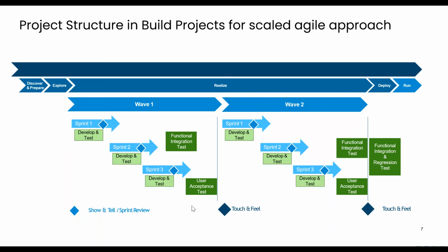The goal would be that at the end of this wave, we would execute a user acceptance test to make sure that the customer consuming these changes is accepting them based on the requirements they had in the beginning. Also, this user acceptance testing would equal a touch and feel. We would expect, for example, the end user to go into the system and actually run an SAP transaction, to understand exactly that that was the requirement.